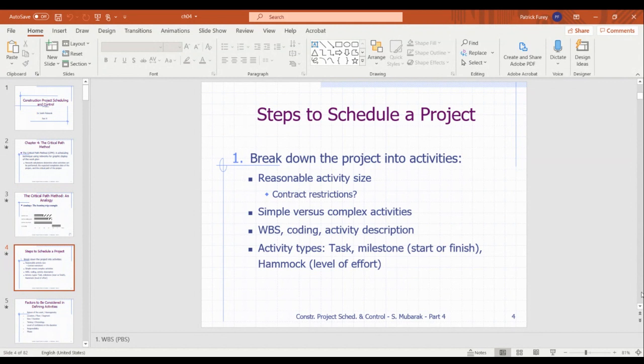After 4 or 5 callbacks, if you call a tradesman out, say my light switch is mislabeled and I'm turning on the wrong circuit when I hit the switch, this needs to be addressed. Well, if some contractor has to send out an electrician to deal with that, it's serious money. It could be $500 to $1,000. Often, a lot of contractors will charge $800 to $1,000 for a day of labor, and obviously the labor guy is not getting paid all that money, but the contractor has overhead, and he has vehicles, and he has insurance, which is really expensive. The workman's comp can be serious dollars in terms of how much you pay out per hour.